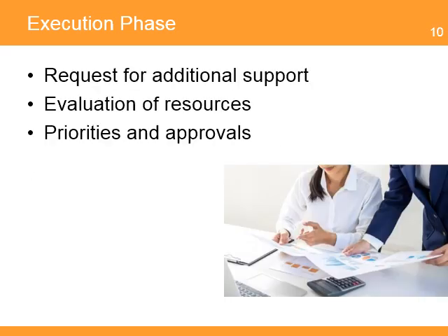For example, the new water and sanitation project manager, due to a change in the schedule to deliver key project outputs, is requesting additional support from the procurement and logistics functions of the organization. The portfolio manager will evaluate and consult with the respective units if they can increase their level of support or if additional resources are required to support this function. In some cases, the portfolio steering committee may change the order of priorities in the use of resources and provide additional funds to hire more support personnel.